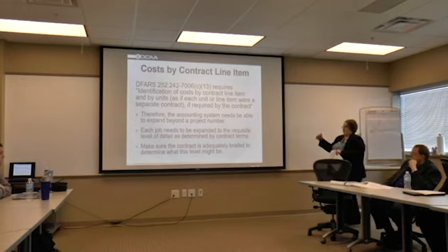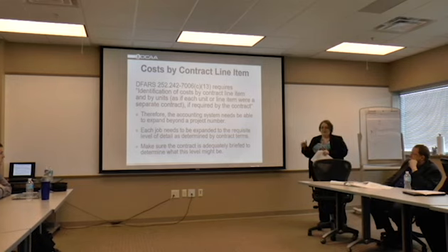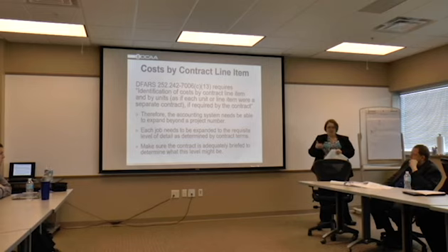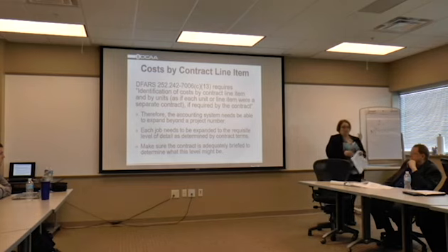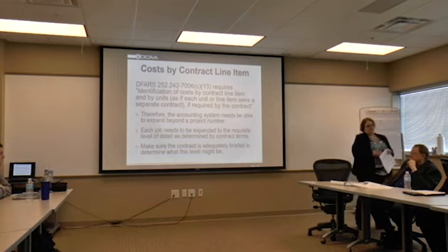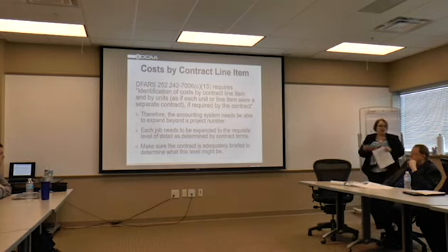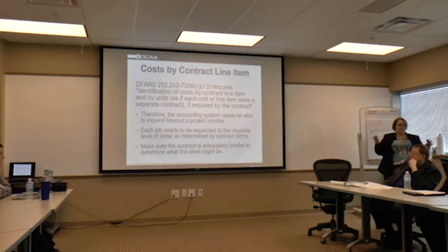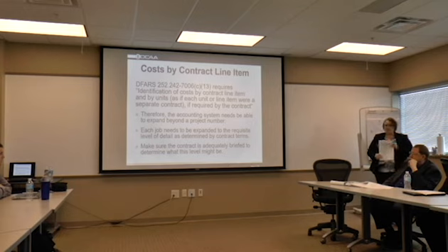So it's very important that, if the contract requires it, your system can track the cost at that level. And it's something that in the last few years has become more and more frequent. We didn't see a lot of contracts with multiple CLINs, funding limitations, and contract value by CLIN before.